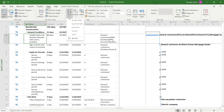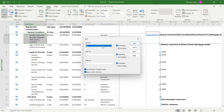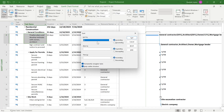After you click on View, you will have the option of Sort. Click on Sort and you will have a lot of options such as by start date, by finish date, by priority, cost, or ID. We are going to renumber our tasks by clicking on Sort By and then selecting options preferable to our conditions.